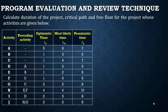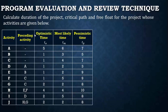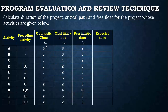We are going to use Program Evaluation and Review Technique to solve a problem to find the duration of the project, critical path, and free float. The project activities are given in a table: the first column represents the activities, the second column shows the preceding activity indicating the interrelationship between activities, and the third, fourth, and fifth columns represent optimistic time, most likely time, and pessimistic time.